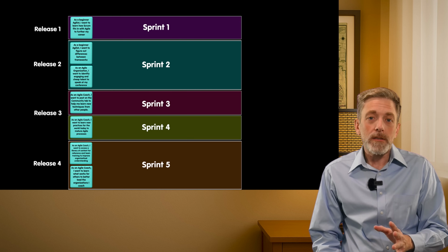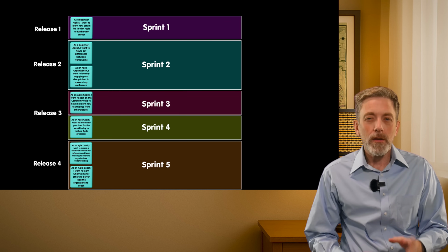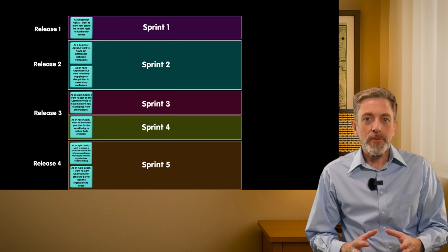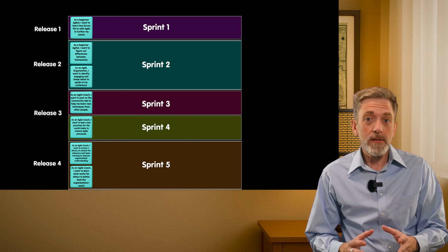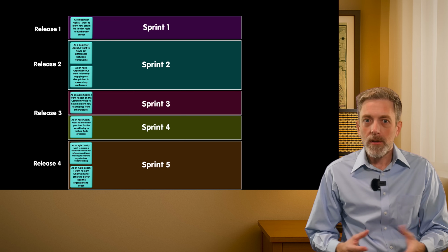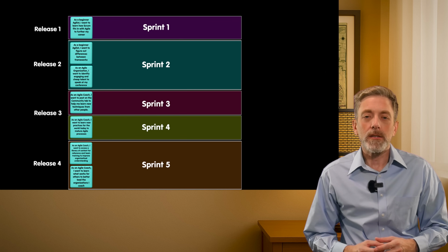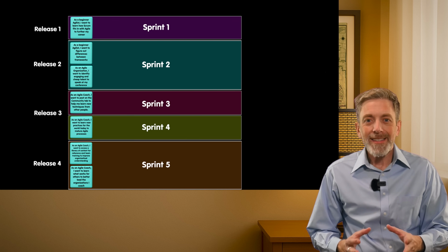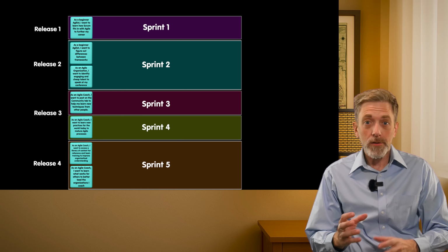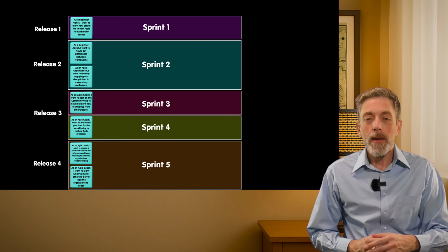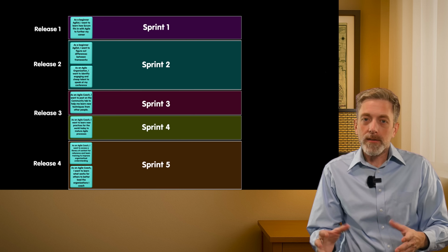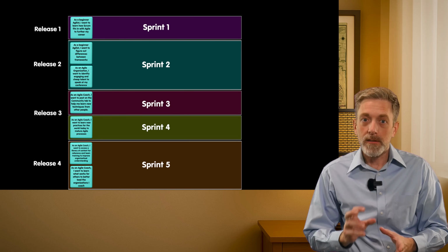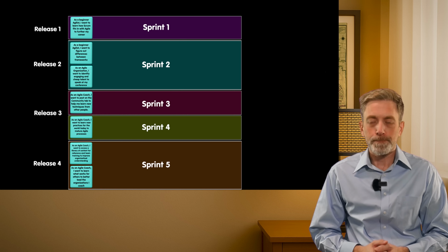And also often organizations want to schedule releases during maintenance windows. Grouping together multiple user stories can make more sense in those cases. Like support people can be on hand to ensure nothing unexpected comes up. But again, even in those cases, keeping independent user stories is important because you can, again, mix and match them. Maybe during that release process, one piece of functionality isn't working as expected, and that can be pulled out because it's independent of the others. Okay?